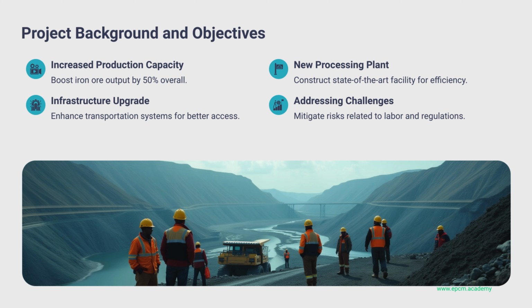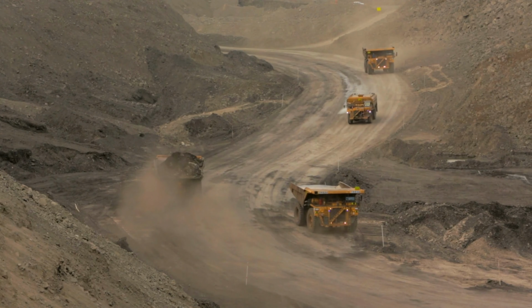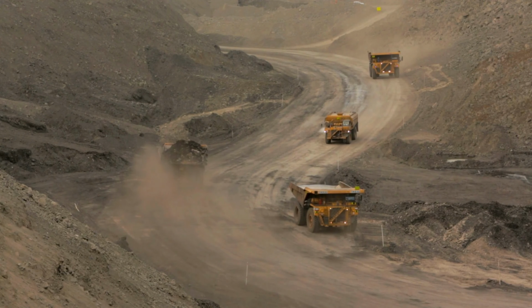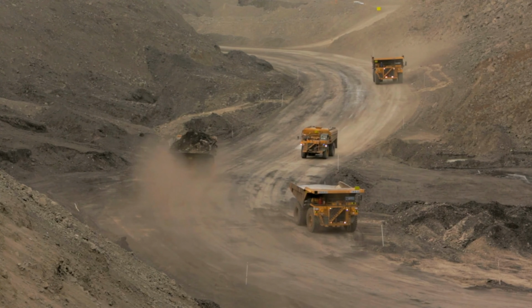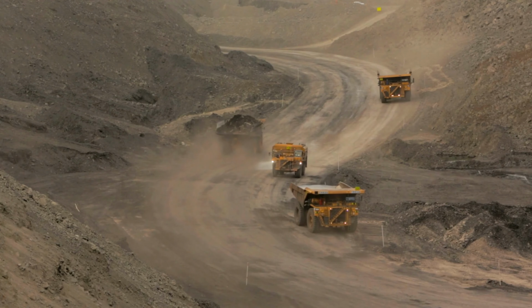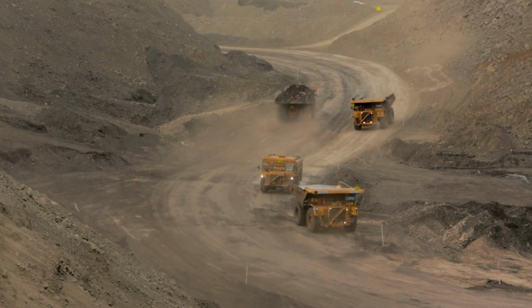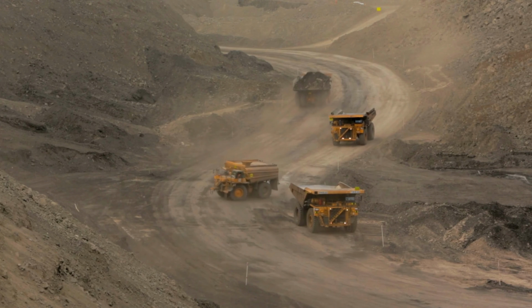Here, the project involves expanding iron ore production at an existing mine. They're aiming for a 50% increase in production capacity. To do this, they need to build a new processing plant, expand the existing mine pit, and upgrade all the associated infrastructure, rail lines, the whole works. Wow, that's a massive undertaking. And I bet the remote location adds another layer of complexity. Absolutely. The document highlights how factors like the remote location, the shortage of skilled labor and materials, the stringent environmental regulations, and the volatility of commodity prices, all of these can really throw a wrench in your plans if you're not careful.